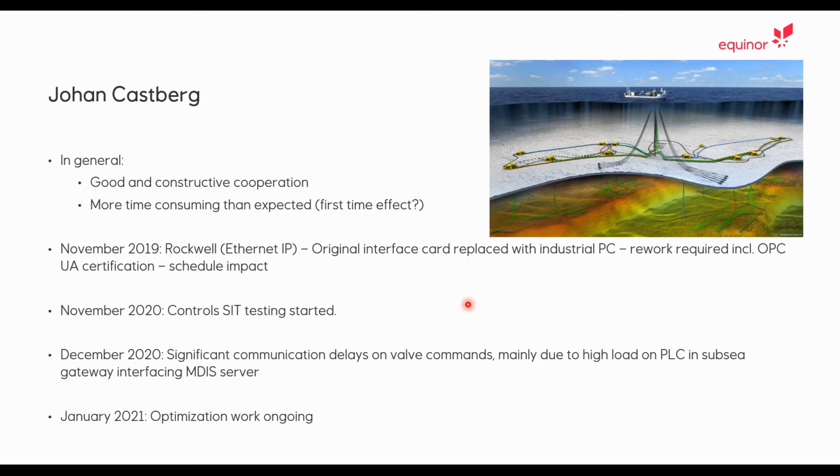Just from a timeline perspective, we had one challenge when we had to replace the original interface card due to performance challenges with an industrial PC that required rework and a new, let's say, certification. And that resulted in schedule impact, which on the bigger scale did not impact the entire project schedule, but it was impacting the delivery of that sub package.